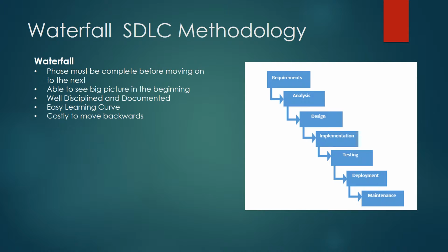Because design is completed early in the development lifecycle, this approach forces multiple software components to be designed early on in the project. This approach does not allow you to backtrack to a previous stage without going all the way to the first stage again. At the end of each stage, there is a requirement review before moving on to the next stage.